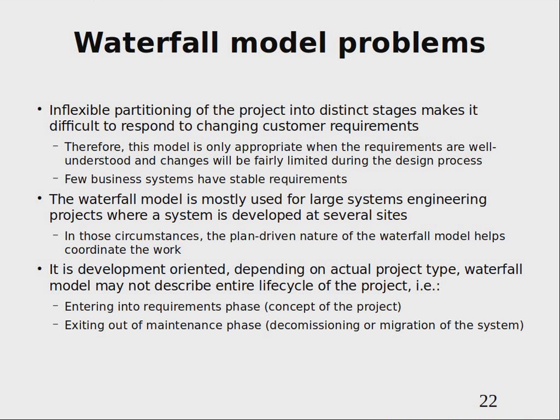Another problem is that it is inflexible, so if you follow this particular model precisely, you never go back, you never respond to changes. So if you expect some changes, the expectations for these changes should already be put into the model as expected changes, and you expect them in the required amount of time and react to them in the prescribed way.